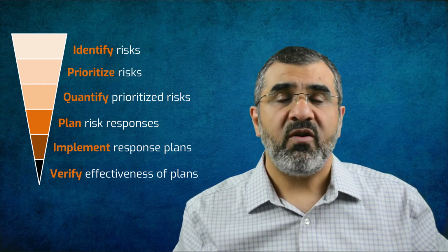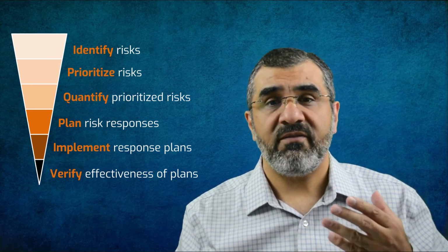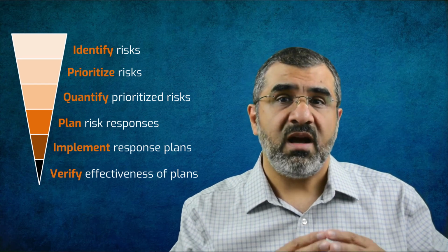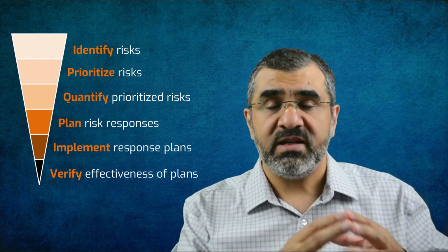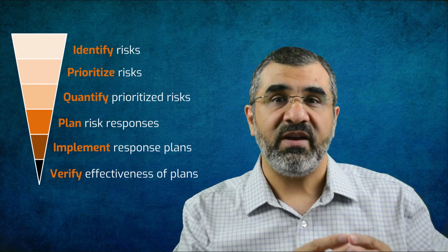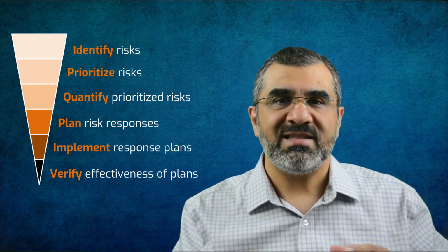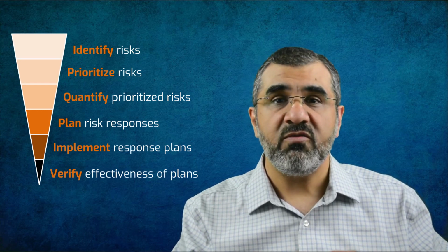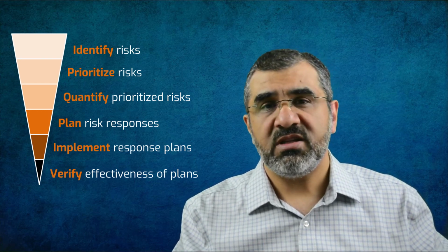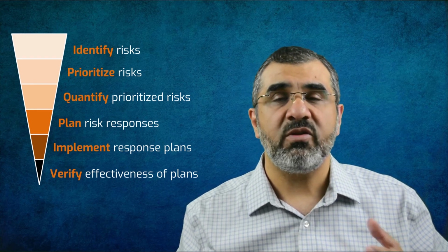One method is to perform a risk audit of the risks that have occurred. The project manager is also to ensure the whole risk management process is working effectively for the benefit of the project. If there is any issue or weakness that comes up during the audit or reviews, the project manager and the project team may suggest a change request to correct or prevent it.